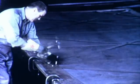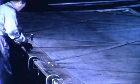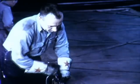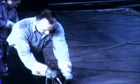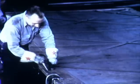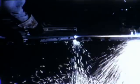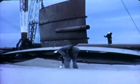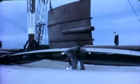Special steel plates for the enclosure were produced in the Greenville, Pennsylvania plant of the Chicago Bridge and Iron Company. Plates, which measure approximately 10 feet by 30 feet, are 1.25 to 1.5 inches thick. They were shipped by rail to the site where they were welded in sections. Each section was made up of 3 plates. The first sections to be erected were located at the equator of the sphere.